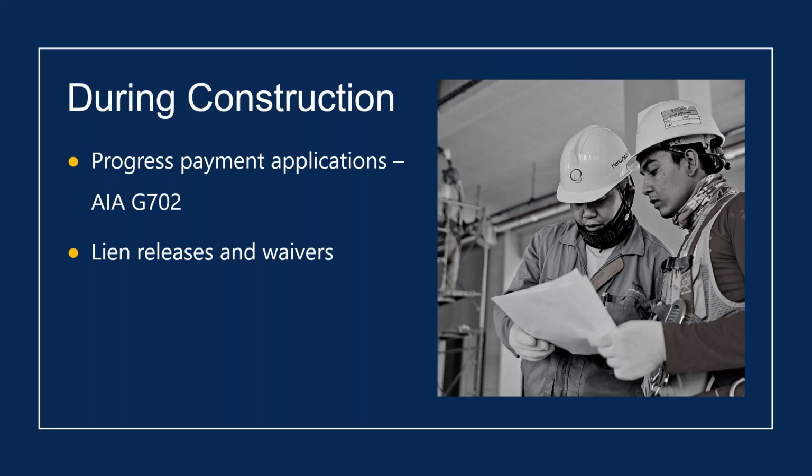And let me talk to you a little bit about lien releases and waivers. Be very, very careful when you are executing a partial lien release. Partial lien releases have killed many a contractor's case because you have unintentionally waived your claims. It's important that when you get a lien release and you're asked to sign it, you are only releasing for what you're getting paid for.